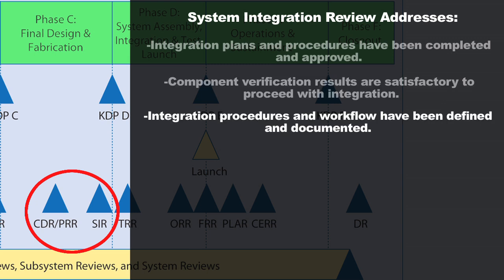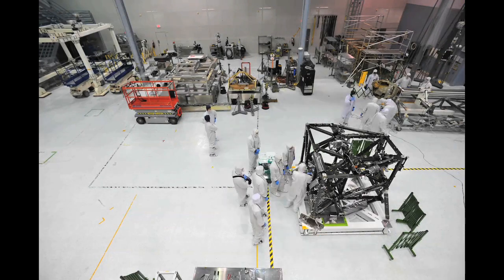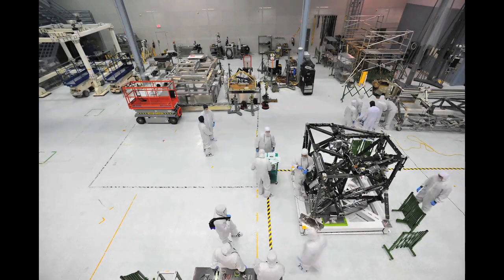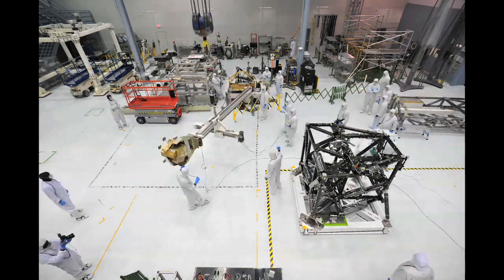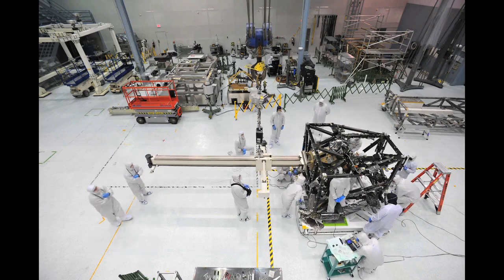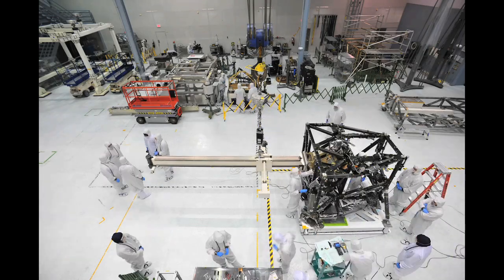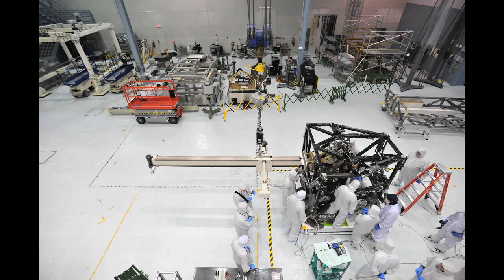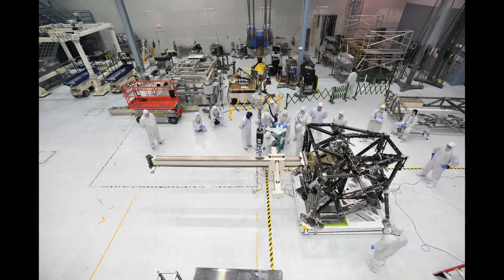Component verification results must be satisfactory — you've done testing of individual components to verify they meet their requirements at the lowest level, and the System Integration Review checks that they all passed. Integration procedures and workflow have been defined and documented, and integration personnel have all received required training. A lot of satellite integration happens in clean rooms — very clean environments with heavy equipment and confined spaces — so integration personnel need specific training on working in close quarters, with heavy equipment, and in clean room environments. Everyone must be certified before integration starts so it doesn't hold anything up.